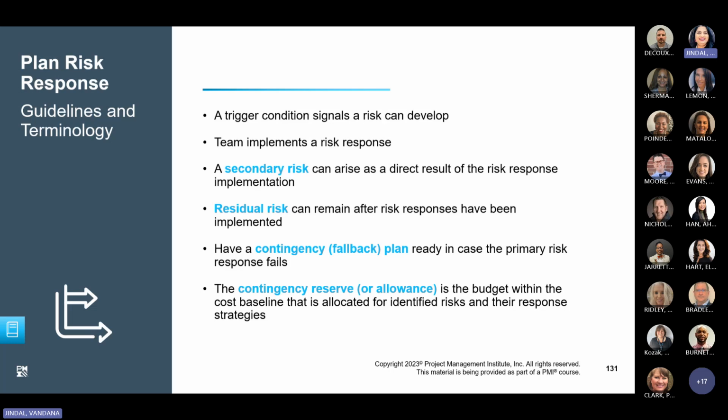The project manager has a contingency plan to hire maybe additional workers after the storm to catch up on the lost time if necessary. And the contingency reserve would be that the project includes a contingency reserve of $10,000 that can be used to cover the cost of the extra workers. So these are the examples that I shared. Most of the time, questions are also asked in those terms by putting you in a situation: this is a situation, what do you think? What's happening there?